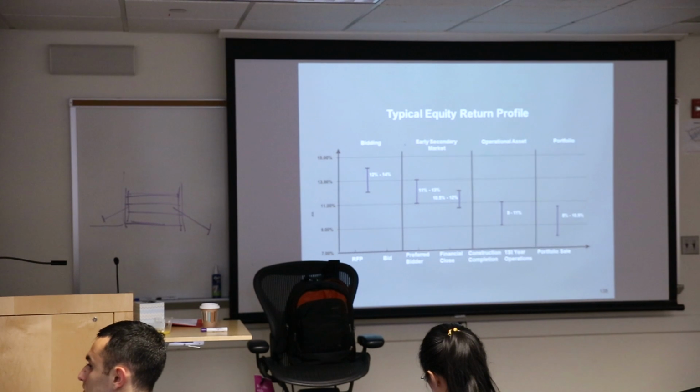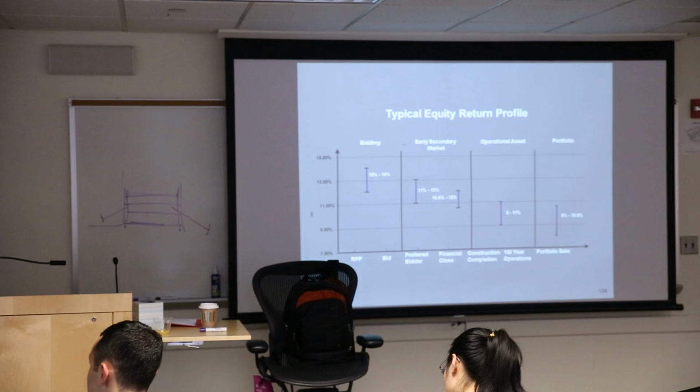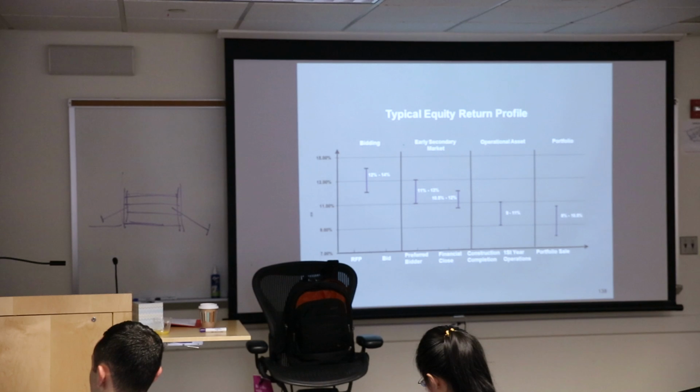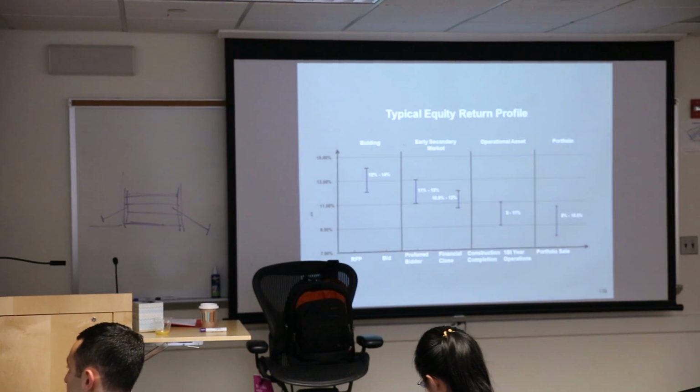You see, if you remember my diagram, you spent all this money up front and then it was kind of constant. So many people would argue it starts at substantial completion, where the money flows in. Others will say, but just a minute, you just spent a lot of money building it and there's equity in there. I don't know where people land on this, but it's a big issue as to when the return on investment clock starts ticking. It has a huge impact on that number.